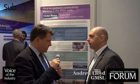Right, and how often on a route, what percentage of a route would that be used? I suppose it depends on the actual project, but on average? It's very close to the shore, or if we're going through an anchorage, if the cable can't be routed around an anchorage, so approaching Hong Kong or Singapore, you just can't avoid it. So we bury the cable extremely deep in those locations, but we're talking about 1, maybe 2% of a cable route. Right, so in very specific areas where those cables are under deep risk. Become under a specific threat.